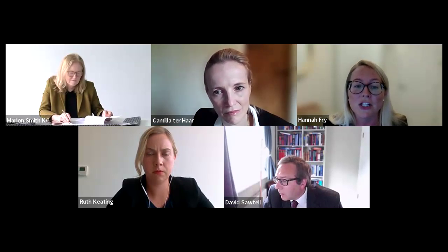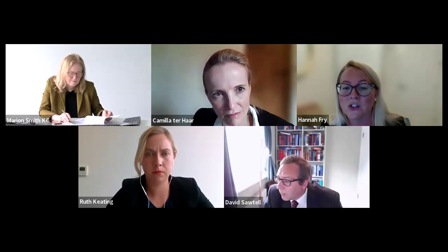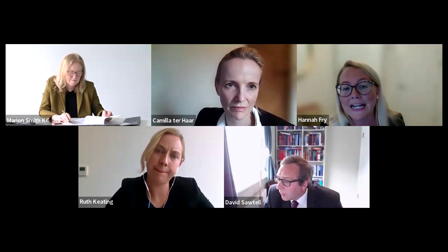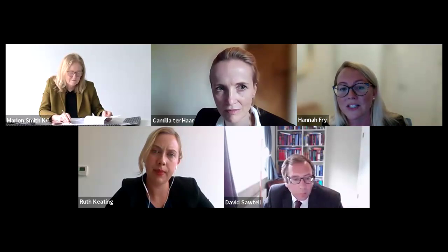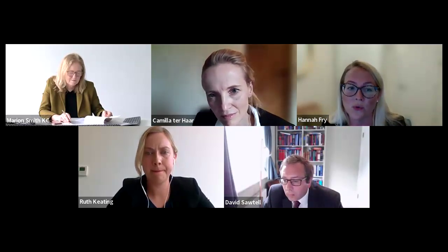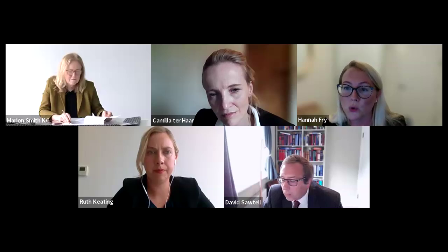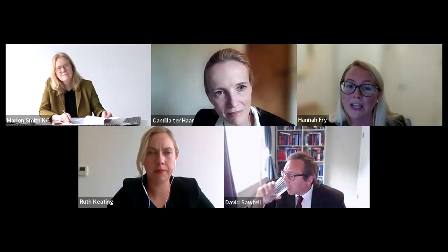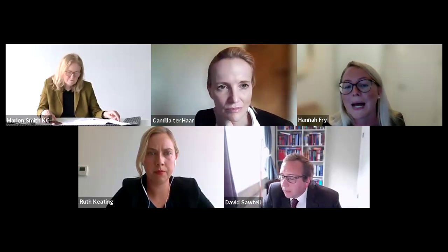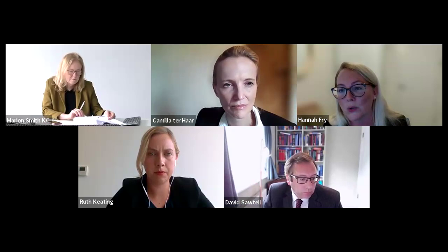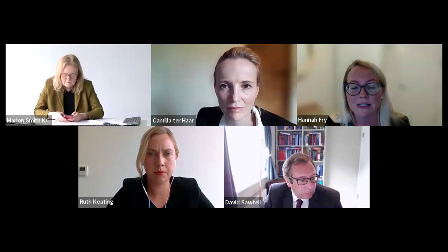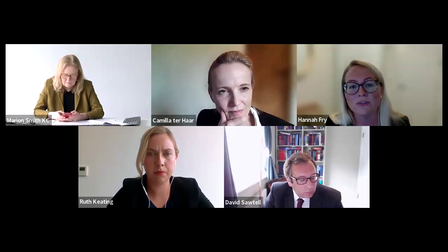So it says any change in law, publication of guidance, or the exercise of any statutory power by the UK government, any local authority, or in the case of guidance, the Construction Leadership Council, which affects the execution of the works. So this is much broader wording than we've seen before, and it replaces the existing termination event of the exercise of a statutory power by the UK government or local authority. So those two new grounds for termination should be something that users should be aware of.